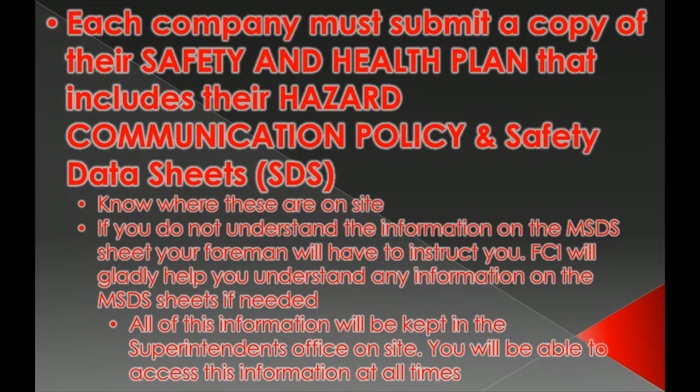Each company must submit a copy of their safety and health plan that includes their hazard communication policy and safety data sheets. Know where these are on site. If you do not understand the information on the MSDS sheet, your foreman will have to instruct you. FC will gladly help you understand any information on the MSDS sheets if needed. All of this information will be kept in the superintendent's office on site. You will be able to access this information at all times.